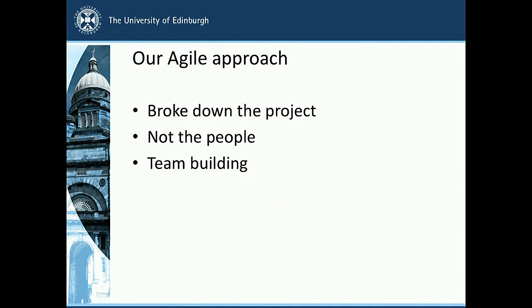For the release cycles towards the end of the project, from 2 to 5, we had 3 development iterations and one non-development iteration within each release cycle. We had the flexibility to move the non-development iteration to places where it worked for us, depending on the user stories or people's availability, with annual leave and so on, without having to move the release dates. That flexibility was very good. And we decided early on not to break up the people.